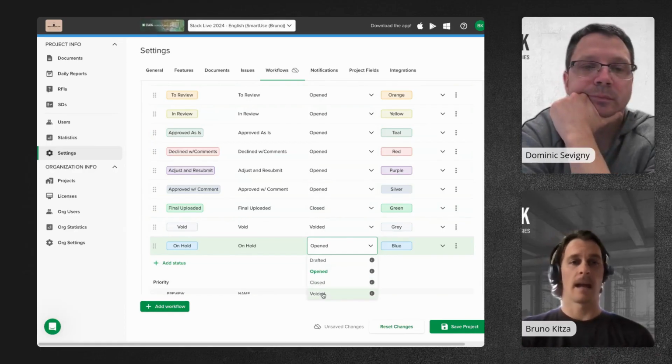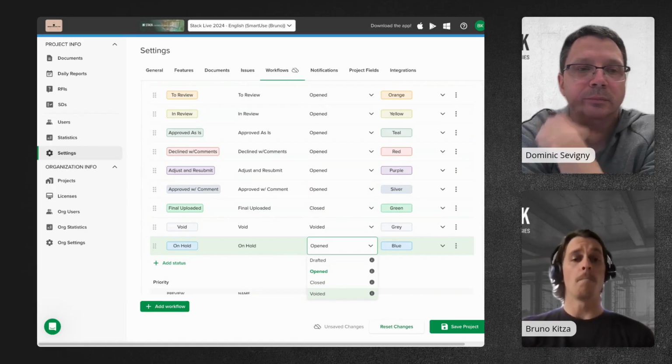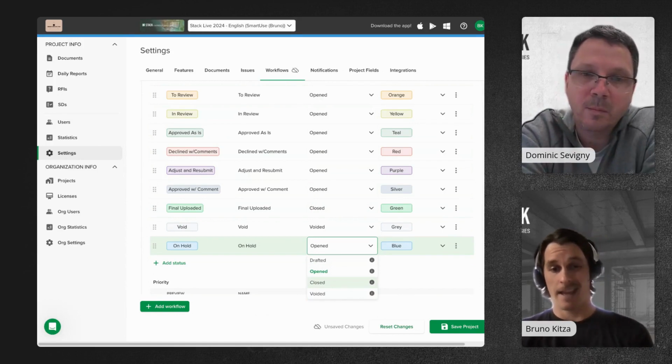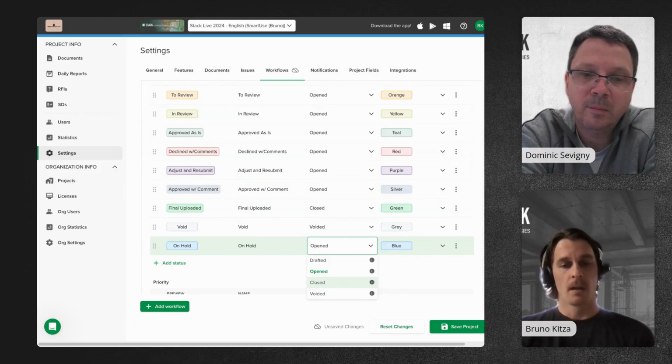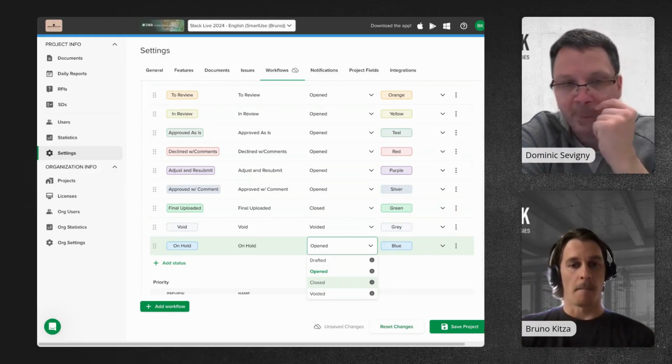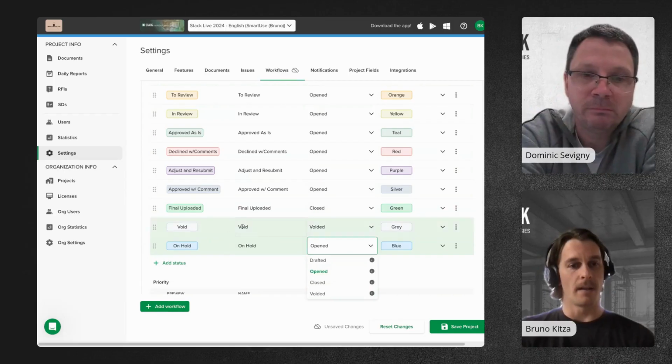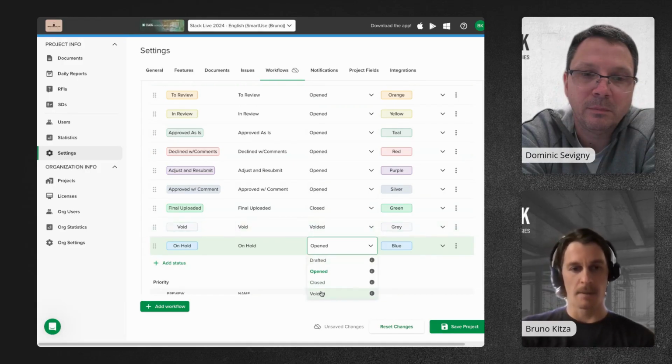And if for some reason, as part of the shop drawing list that I received from the GC or my professionals, down the road, we get to a point where this shop drawing won't be required anymore, it's not completed. It's basically canceled. So we still stop the process, the notification, but it's basically interrupted mid-process. So we have a void status here that is a bit of a catch-all for every shop drawing request that would no longer be required.